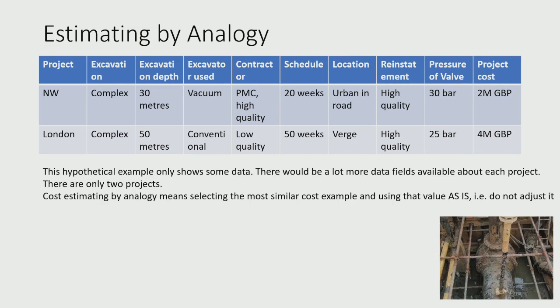If you stop the trains at Network Rail, it could cost you £1 million for a period of weeks. If you stop the trains for a few hours at King's Cross Station to do some work on utilities, it would cost you about £1 million to pay Network Rail. Sorry, Network Rail. Because what they do, they call it possession of tracks.